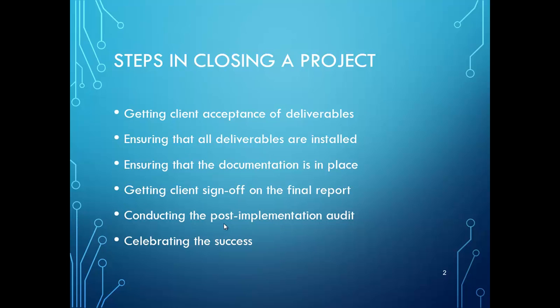So either physical products or just reports for the stakeholders — that will be the end of the project. Part of the deliverables will be the installation. If you are installing a software or training the employees for that software, that will be part of the deliverables. Providing the proper documentation such as user and technical manuals for the software or the training itself. Included will be a sign-off sheet, like a checklist, that the client or stakeholders will sign and approve what has been submitted.